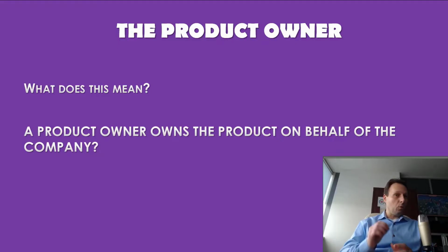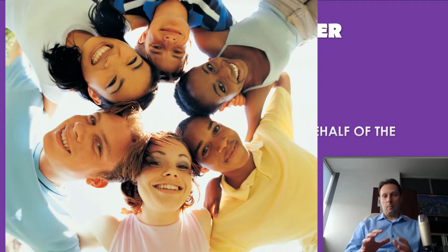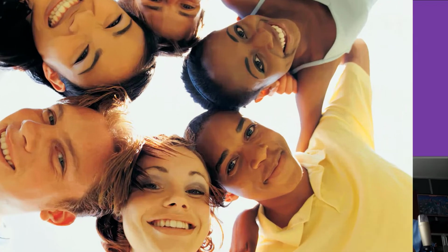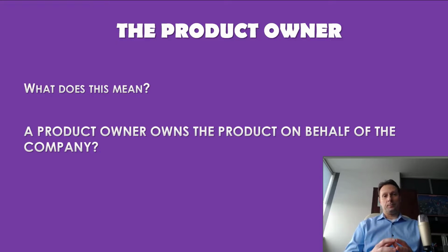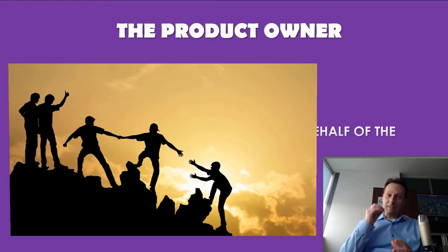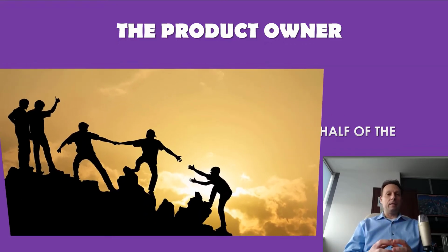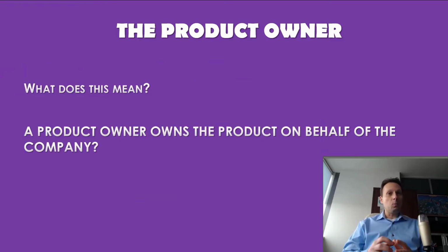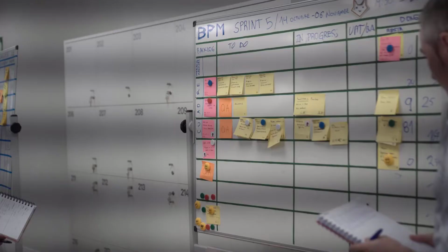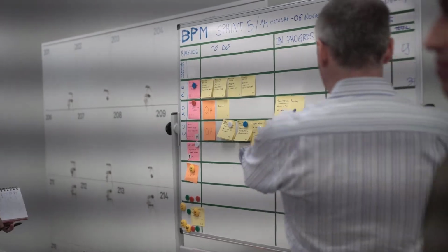Most importantly, a product owner has no authority over the Scrum team members, but he has the authority to make all decisions necessary to complete the project. The product owner does not say, "We have 4 sprints left, and therefore you must do 1/4 of the product backlog this sprint." No, this is not the case. The Scrum product owner's job is to motivate the team with a clear, elevating goal. The developers know best what they are capable of, so they select which user stories from the top of the product backlog they can commit to during any sprint.